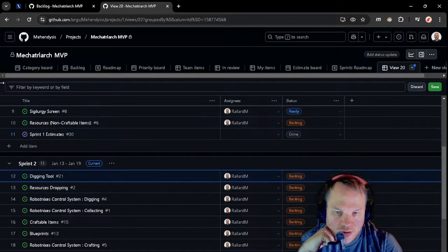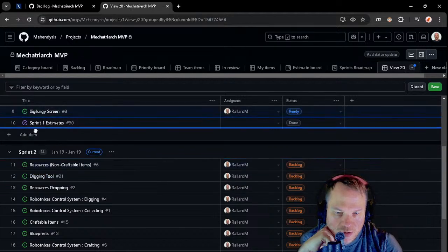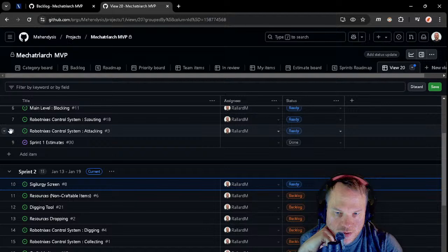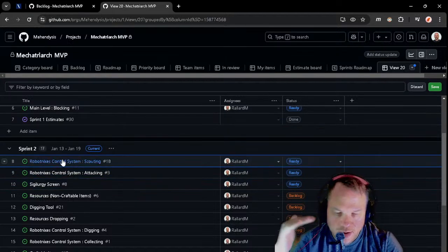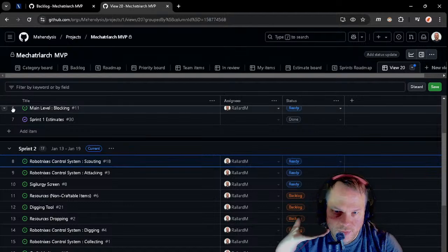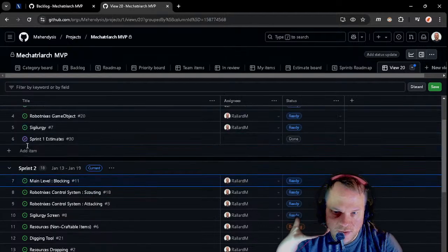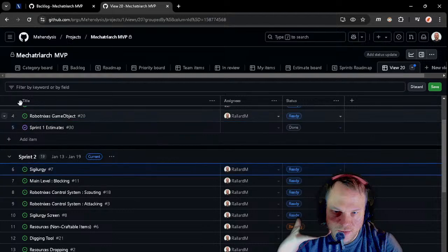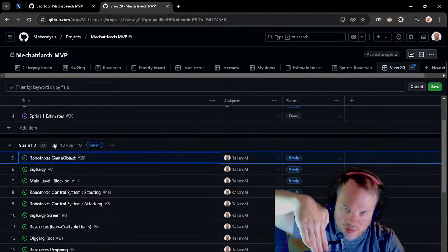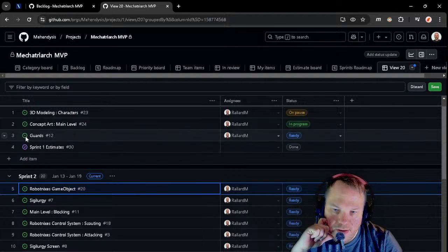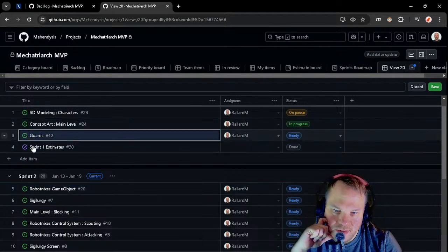Lowered in relation to time and what I did, the amount of things I did. That way, if the curve is horizontal, it means that I need to go faster. If it goes steep down, it means that I can take it slower.